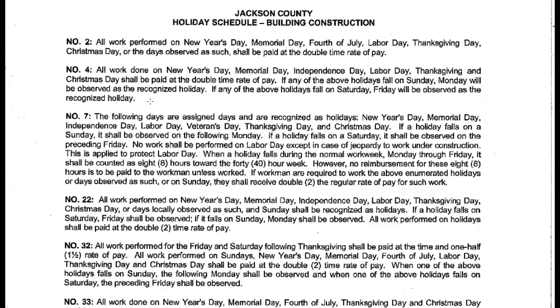And if any of the holidays that are listed, we just talked about, fall on Sunday, Monday will be observed as the recognized holiday. Okay, and if somebody works on that Monday after Memorial Day or Christmas, then it's considered the holiday, and they get the holiday rate, which was described up above in item 65. So you'll have to go back and forth. But for those types of workers that have number 4, these are the holidays.